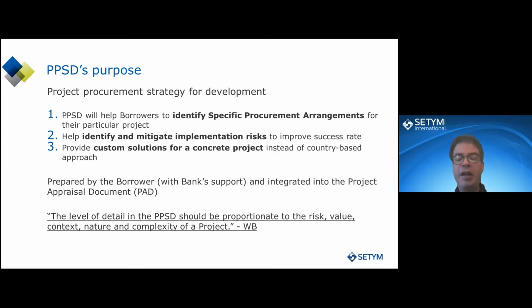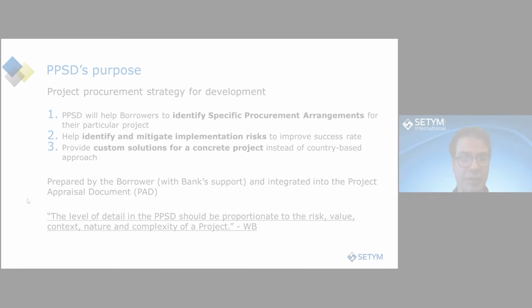In other words, if you do a risk analysis, every project will be different, and you will be able to have a custom procurement solution for every project. That was not the case before the reform. You have very little choice. Who prepares the PPSD? You prepare the PPSD if you're involved in the project itself. In other words, the project team will prepare the PPSD. It is integrated in the project appraisal document, also known as PAD, and the level of detail should be proportionate to the risk, value, context, and complexity of the project.